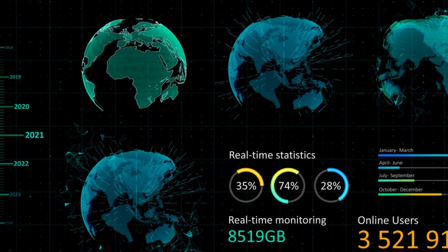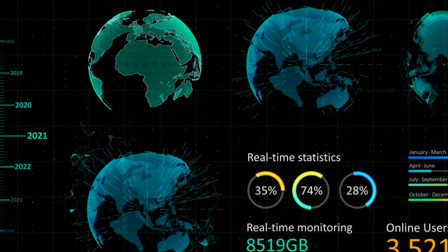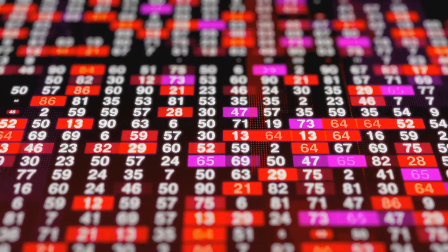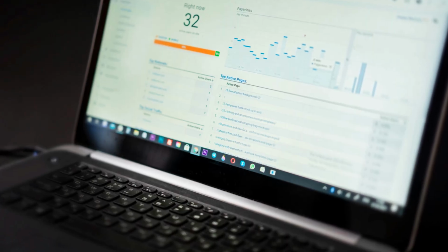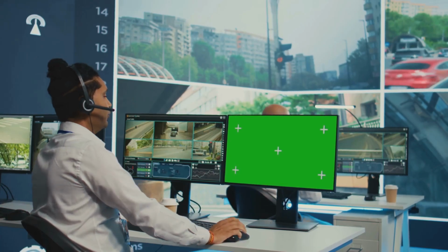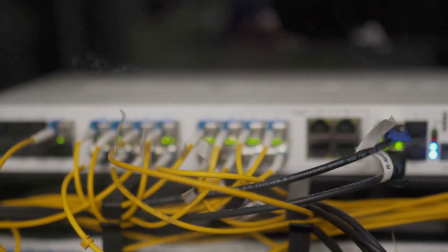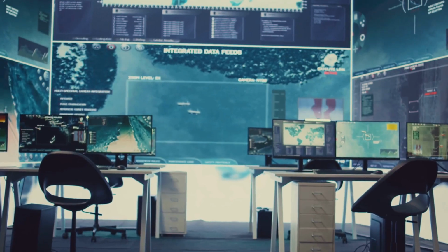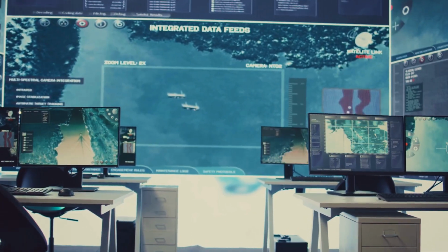They take the optimized raw designs as one input, then they layer on many other types of data. Geological surveys that indicate soil type, helping to predict whether crews will encounter soft dirt or hard rock. Localized labor cost data. Current market prices for fiber cable and equipment, terrain data from satellite elevation maps. By combining all these factors, the AI can generate a detailed line-by-line cost forecast for each proposed network segment. This moves beyond simple per-meter cost averages and provides a much more granular and defensible budget.